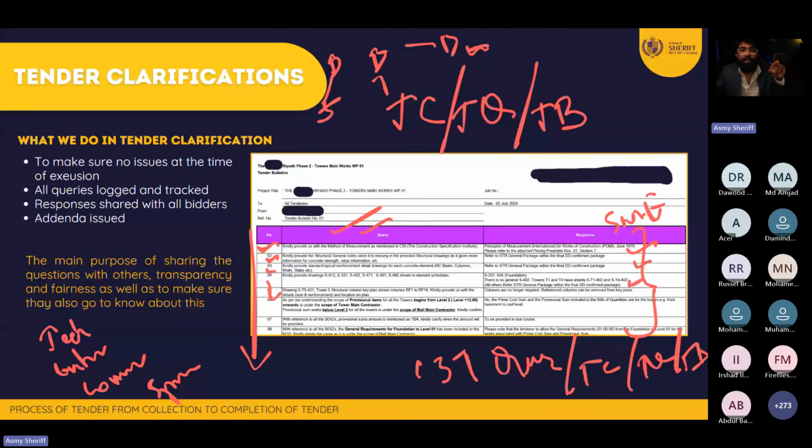So you can't send the query as it is. You need to remove that. You need to remove DEPA, IMAR, Alganim, Nesma, Bhavani, whatever it is. You need to remove that name. Don't disclose anything. Be very careful.